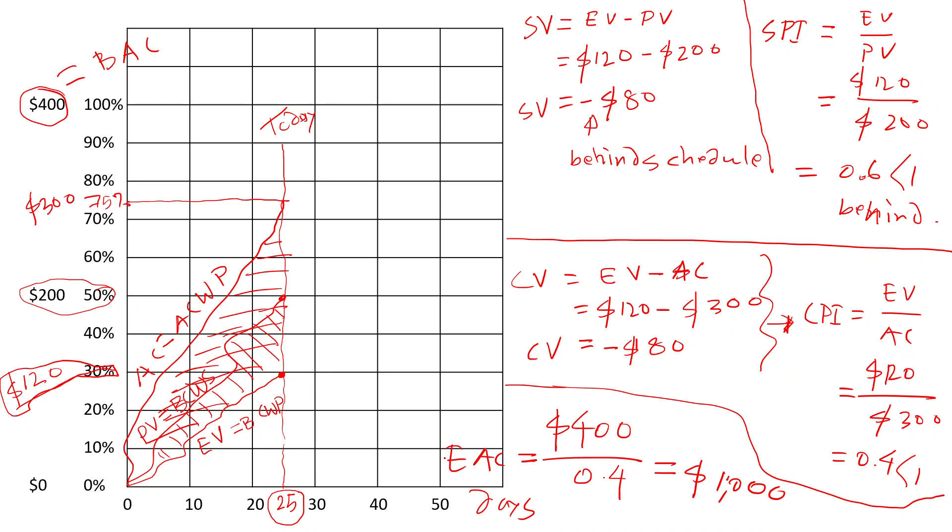If you try to develop another variance matrix, variance at the completion, you can simply do that BAC minus EAC, which is in this case negative $600, which is negative again. Negative means at the completion, it's going to be over-spent.